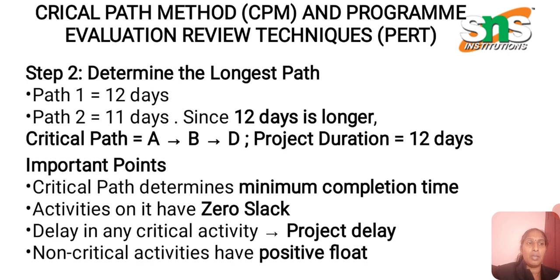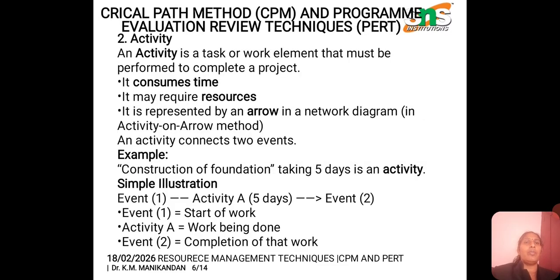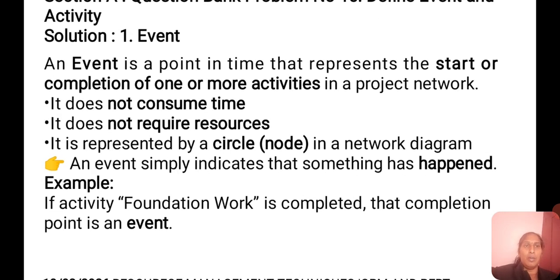A non-critical activity has positive float. Now we are going to define what is meant by event and activity. An event is a point in time that represents the start or completion of one or more activities in a project, and it does not require resources and does not consume time. An event simply indicates that something happened. If the activity of foundation work is completed, then the completion point is an event.